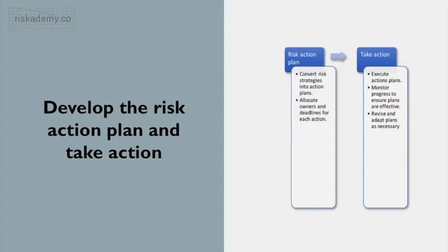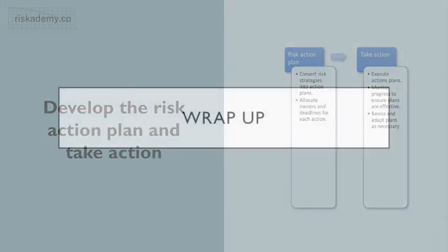While executing the action plan, the risk owner should monitor its effects to ensure the strategy is effective. Even if the overall risk might not reduce immediately, the effects of the strategy should still indicate whether or not steps are being effective. As risk strategies advance or are completed, the revised situation can be incorporated into the next phase of reviews or assessment and the risks recalculated. Assuming that the strategy has been effective, that particular risk action can be considered closed and should be recorded as such in the risk register. Where a strategy has not achieved its stated objective, a revised strategy may be necessary.